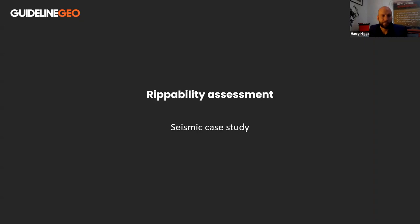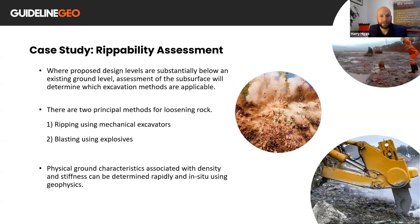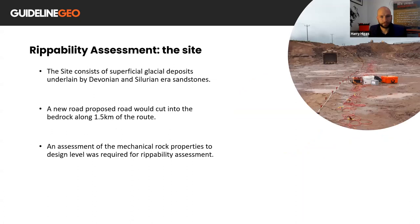Then we have a second short case study. This one was for ripability. So when the ground needs to be excavated to reach a certain design level, if that excavation cuts into the bedrock, then a method of loosening the rock must be considered. Mechanical ripping is suitable for rocks up to a certain strength. However, if the rocks are too hard, then blasting needs to be used. So geophysics is an often used method for determining rock properties quickly and in situ, and it can be useful in the construction planning process to have this information. This particular site consists of superficial glacial deposits underlain by Devonian and Silurian era sandstones. A new road was proposed that would cut into the bedrock along a route of 1.5 kilometers. An assessment of mechanical rock properties to design level was required for an assessment of ripability.